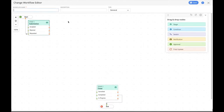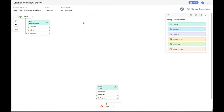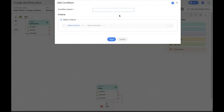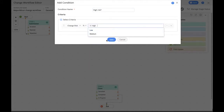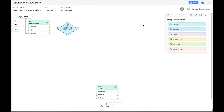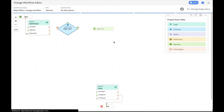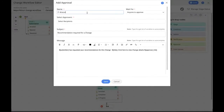Let's give it a name first — let's create a major/minor change workflow, which should work for both major and minor changes. So we can create versatile workflows associated to different types of change. First, let's add a condition node with the criteria that if the change is high risk, it should take a certain path. The conditional node is ready. If the change request is high risk, it needs approval with the IT director. Let's drag an approval node onto the canvas and name it 'IT Director.'